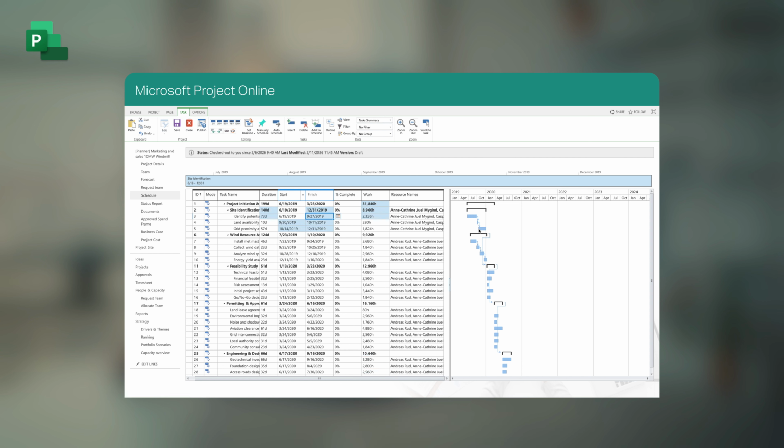You cannot drag and drop tasks in the timeline out here, so the only way to change the start and end date or duration is simply by typing in the grid. I, of course, have multiple views and filters and so on to modify my timeline here. And then another thing I like to point out is, of course, the set baseline, where I can set the baseline for my project here, or I can choose whether it's a manual schedule or auto schedule.